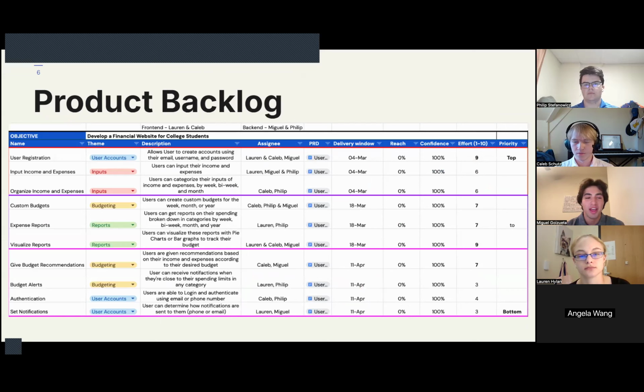Okay, awesome. So now we want to get into how we're going to do this and break it down. We first want to develop a product backlog, which will be identifying the tasks needed to complete from our user stories. We're going to be grooming through the backlog as we continue throughout the project timeline, just keeping it updated and adapting to whatever circumstances we run into.